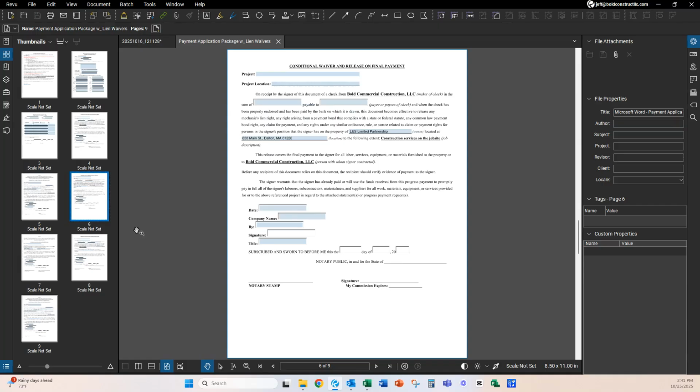Upon final payment, again, those two previous lien waivers for progress payment are going to be used 95% of the time for your payments. The only time you should do a conditional waiver on final payment is when you are submitting for your retainage. Okay, because typically that's your final payment. Occasionally, there might be a situation where you've already submitted for a change order after the fact, and in that case, you would again use final payment because it would be assumed that that change order would be your final payment. Very rare, but it does happen. So the final payment waivers, again, are for retainage payments.